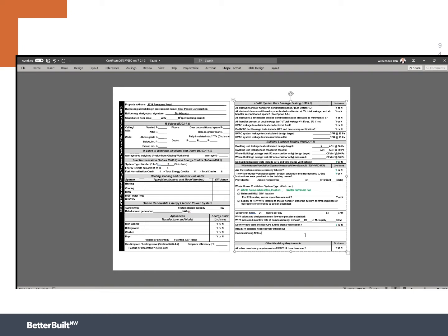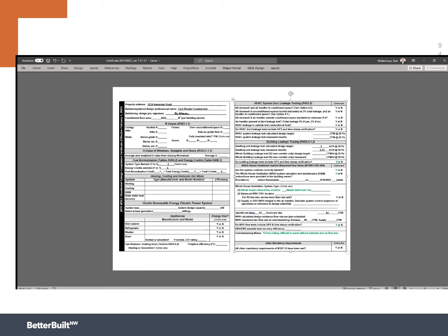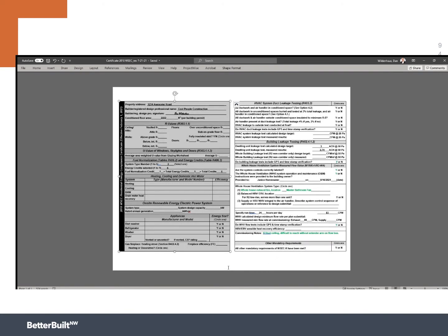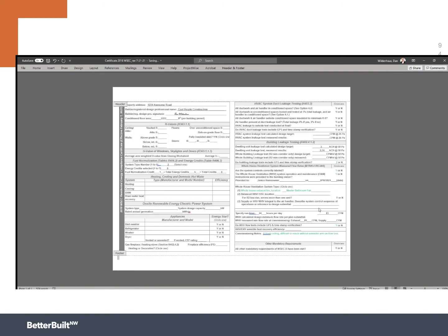So any other commissioning notes that we found here? I'm going to go ahead and say, 12 foot ceiling difficult to reach without extender arm on flow box. Now that may just be me saying that, but that's the kind of thing that's nice for a code official to know that if they were going to double check your airflow for instance. So there you go. We've just filled out one of these forms. We can now print this again on the sticker paper or we can photocopy it, include it with the paperwork, but this is a great way to make sure that we're meeting all of the requirements with documenting this.